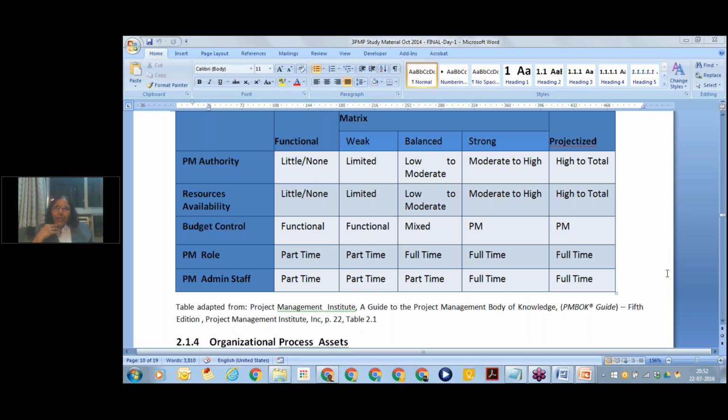So he's saying, from where do you think I'll get that money? I have an annual budget of 10 crores, of which I have already consumed half. I'm not going to give you any money for your reports. So he decides whether he wants to go ahead and buy or not. I try to tell him, the CEO has said these are the systems that are required. Fine, go tell your CEO, I'm not giving. Because the marketing head knows the CEO will also tell him not to release too much money, since he's not going to give any addition. So budget control in the functional case is in the hands of functional managers. In projectized, the project manager decides: total budget is 100 rupees, how much am I going to spend on what?